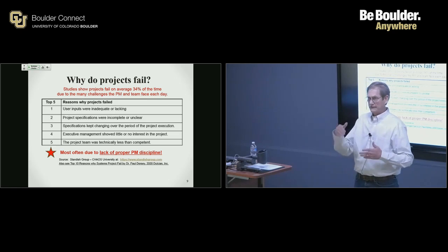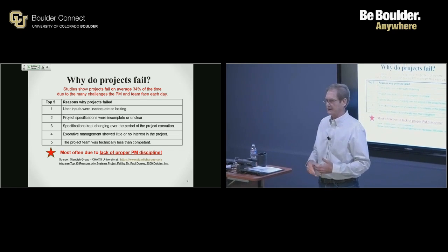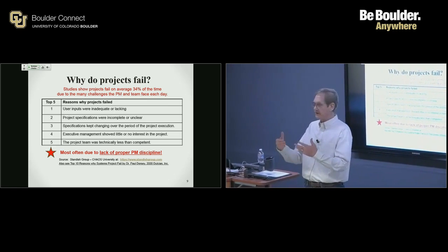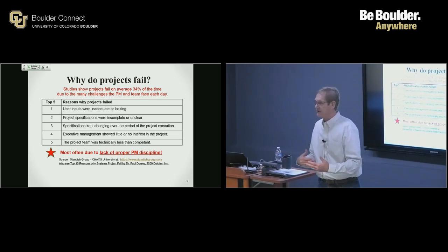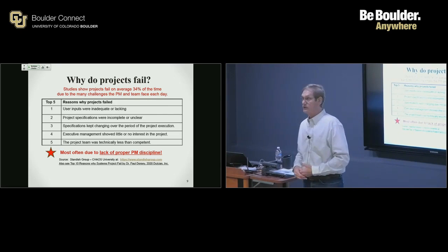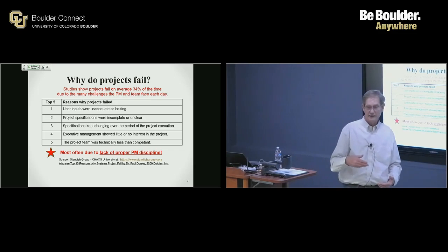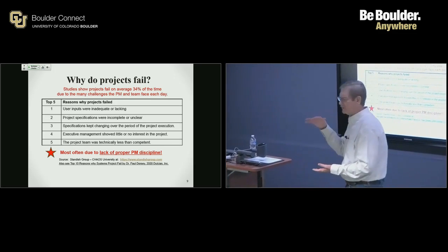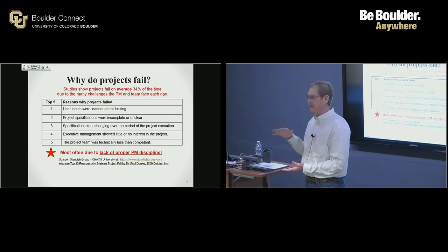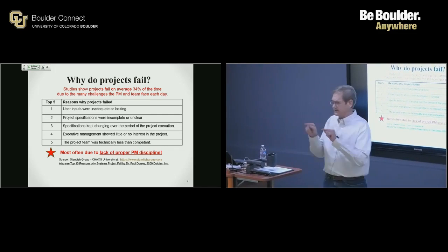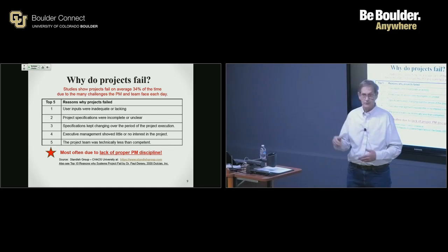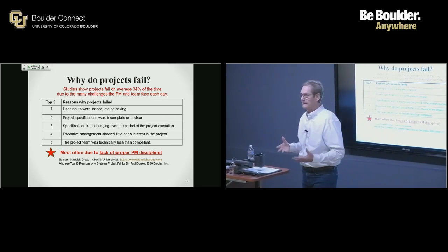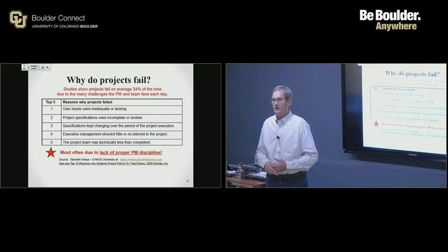And so, what should have happened in this case was that we should have engaged Alex or other subject matter experts, the user community, at least representatives from the community, to get input and say, hey, if we build it, will you come? And when you walk in the door, what are you looking for? What's the logical sequence? At IBM, we actually had what we called a usability lab.